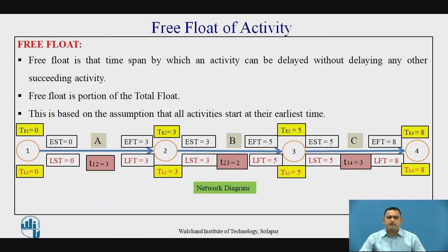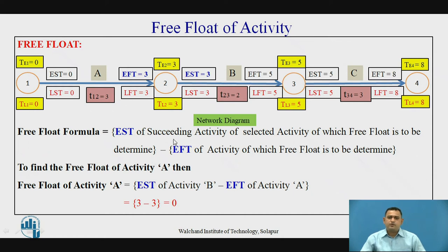Free float is the time span by which the activity can be delayed without affecting the succeeding activity. It is a portion of the total float. The formula is: EST of the succeeding activity minus EFT of the activity for which the free float is to be determined. Free float of activity A equals EST of activity B minus EFT of activity A, that is 3 minus 3, which equals 0.